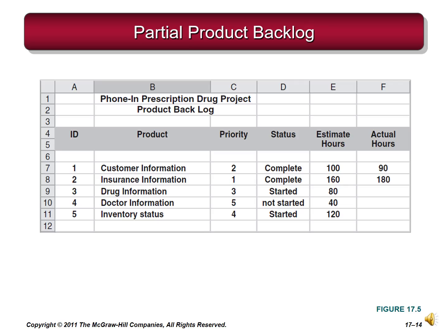The product backlog usually defines each feature and estimates of time, cost, and work remaining. By observing the feature completion rate, called the burn rate, the product owner can estimate the finish date and consider the trade-offs of adding or reducing the features. This table is a partial product backlog for a software project.